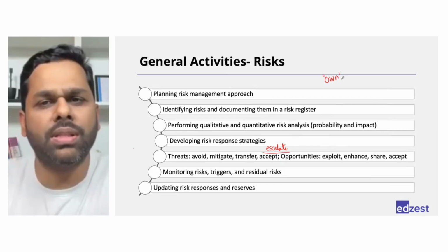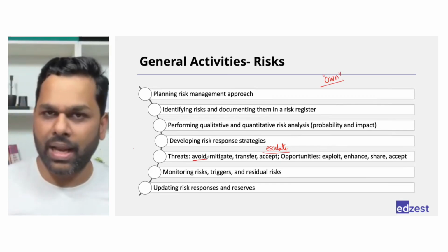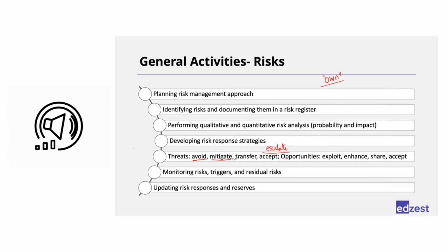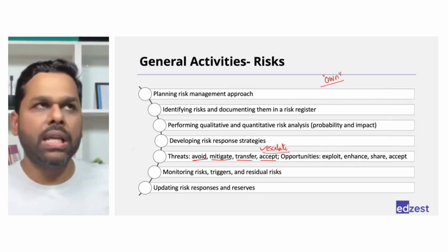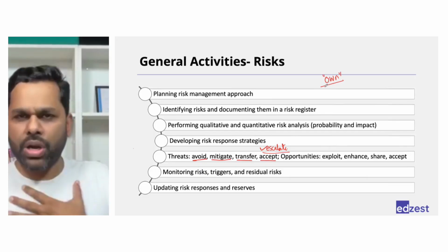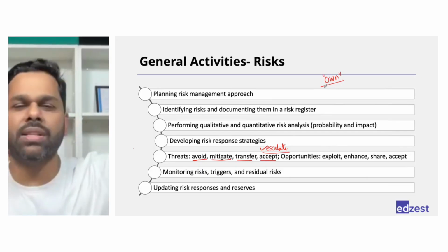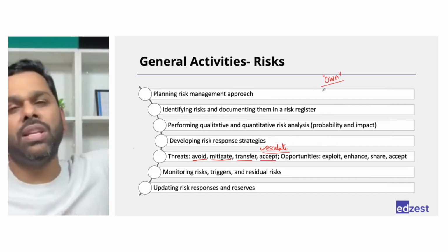Own is not a response. See, what are these? These are responses. Change the plan. Do extra testing, find an insurance company, figure out when it happens, escalate it to somebody else. Own is basically an ownership that you're showing to the rest that yes, I own it, I'll do it. Or that person is a risk owner, or somebody else is a risk owner. You are just assigning the responsibilities to them.